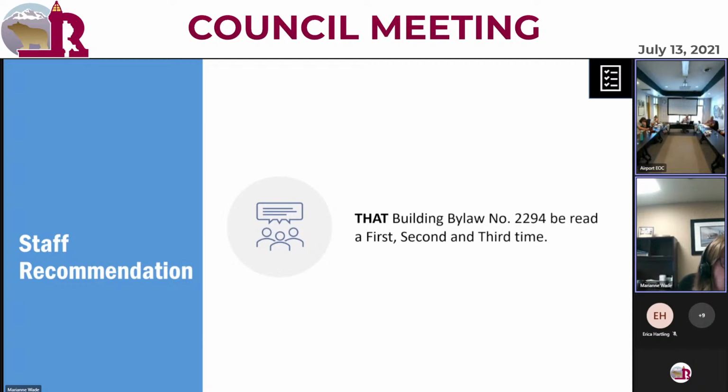Yes, so that 10% would be, 25,000, so what is that? $2,500. And that's just a security deposit to protect our asset, the city's asset, from damage. That's the point of it. Okay, so what's a Part 9 building versus a regular building, just for clarity for the public, please? Part 9 is a single family home, small, what they call simple. And Part 3 is complex, so a multi-family like the Heli Hotel. Okay, so if I'm building the Heli Hotel, I'm still going to pay the 10%. It doesn't matter, or is there a different pay scale on that? It'd just be the 10%. Okay, good. All right, that's Councilor Palmer.